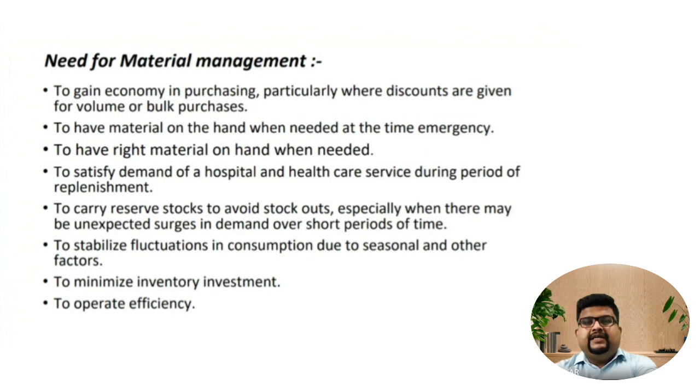Similarly, there are certain materials which are seasonal, which are available only during certain period of a year, and that's the reason we need to identify that a good material management will save large amount of money, large amount of cost of a company. Similarly, certain materials need not to be bought very early stage or in a large quantity, but if we do certain kind of investments or a contract with the vendors, so that particular vendors are liable to deliver the product to us, and they will be giving the material whenever it is required. And that's the reason we should have a strong material management department, or we can say we should have strong material management skills with the project manager.